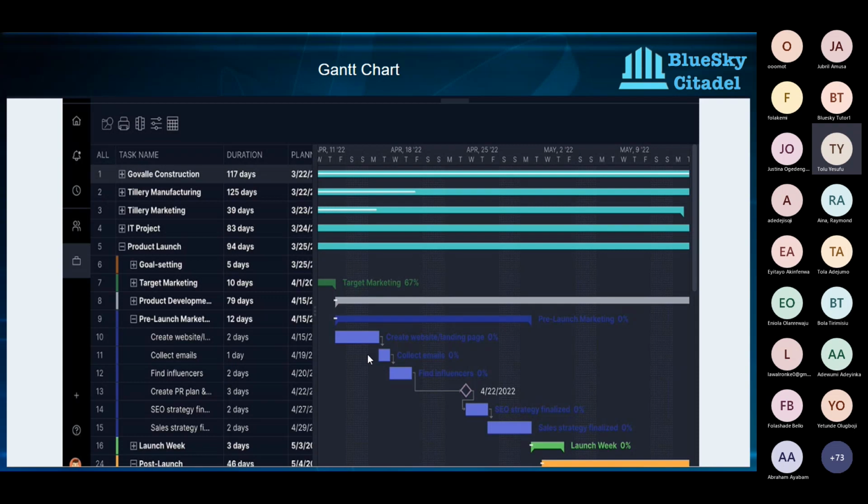You have dependencies. When you use a tool like this to create a plan or a roadmap, you usually have arrows linking things, which represent the different dependencies. Sometimes, like I have with my detailed project plan at work, we even have the names and roles, to say the data engineer should have completed this particular task within this particular time frame. And of course, you have the timeline there as well.